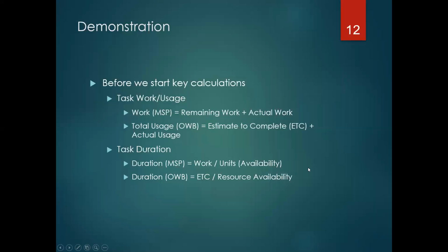Microsoft allows you to put in variable availability as well, and I'll try to show this to you, but the scheduling engine is not sensitive to it. It just shows an overallocation, and that becomes cumbersome. That is the question that I reached out to a Microsoft expert online about. I'm going to see if he gets back to me, and I can update the notes with his response, because I was not able to get this to be sensitive to that. Thus my bias towards Open Workbench.